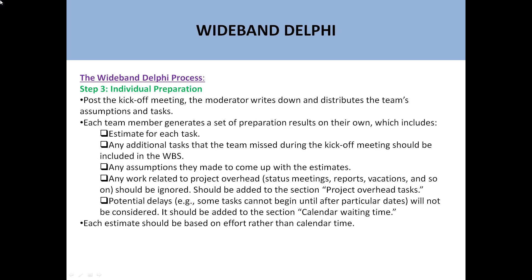Next is individual preparation. After the kickoff, the moderator writes down and distributes the team's assumptions and task list. Each team member independently generates estimates for each task, notes any additional data the team missed during the kickoff meeting, any assumptions, any work related to project overhead, and potential delays. Each estimate should be based on effort rather than calendar time.